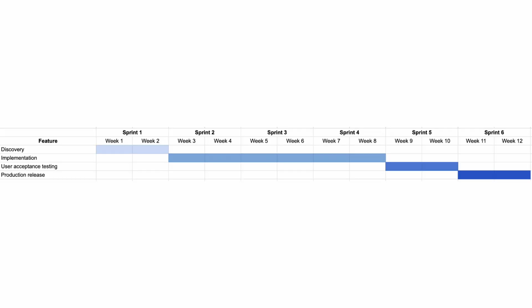Let's imagine we are to build an integration between our CRM and website. So we might split the whole project into the following milestones. Discovery, for example, 1 sprint, implementation, 3 sprints, quality assurance and release to production can take 2 sprints. So it's a high-level roadmap, but even this map can already help you to understand what resources you need during which milestone. To plan delivery properly, we need to build a detailed roadmap. Let's make a detailed one based on the high-level example we have just taken a look at.